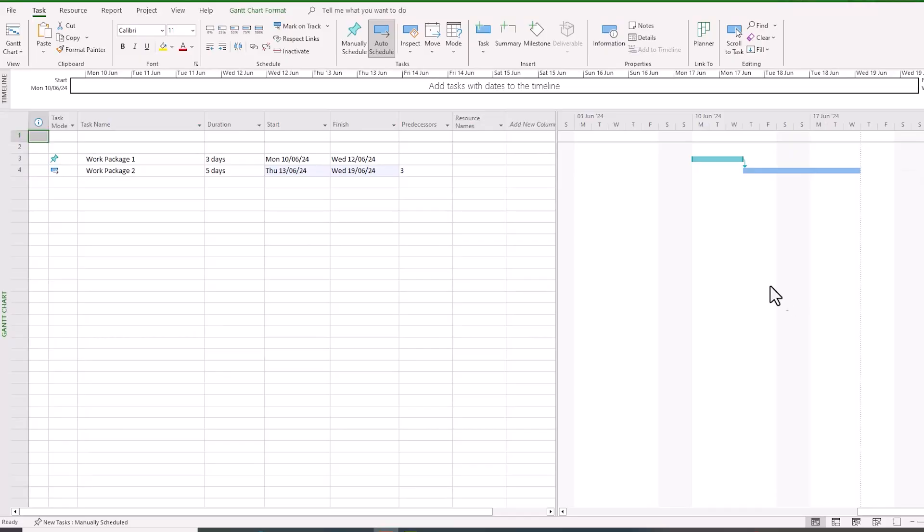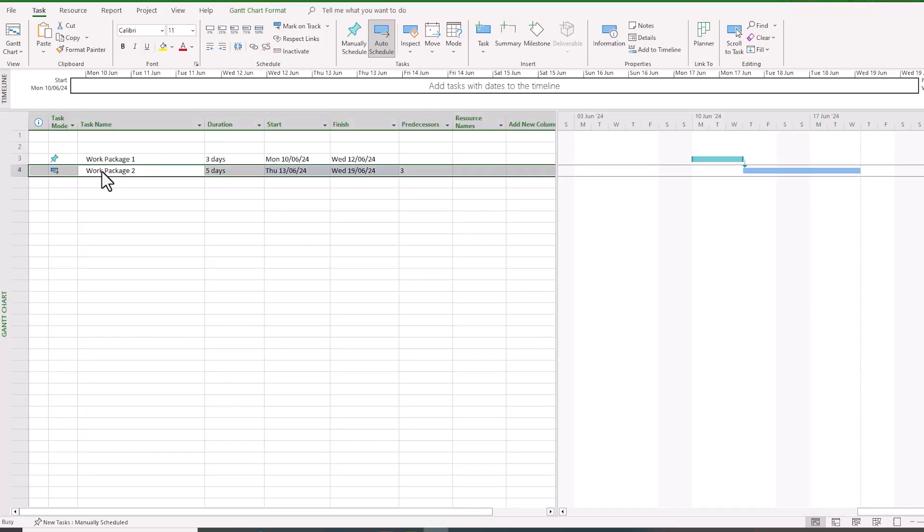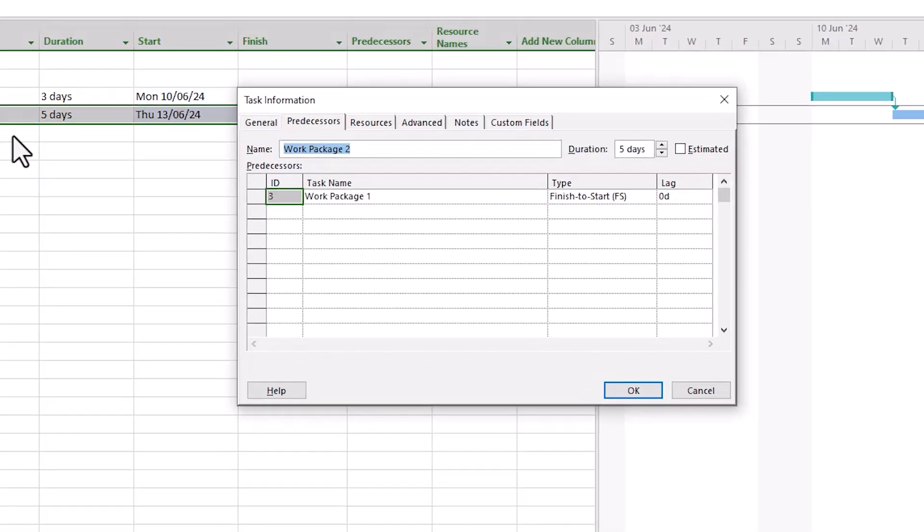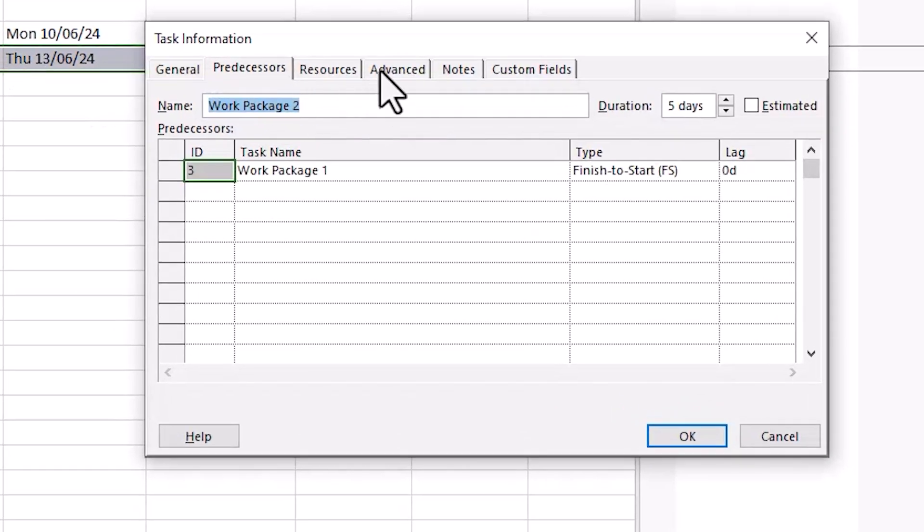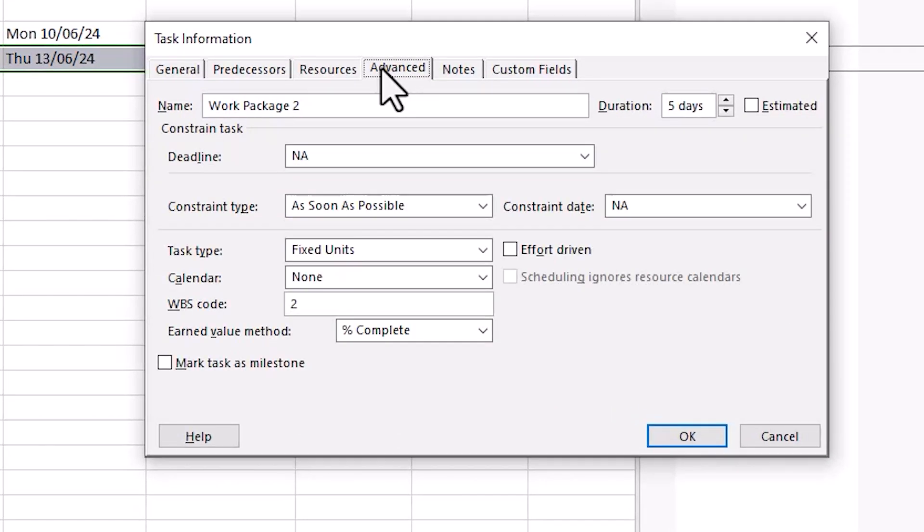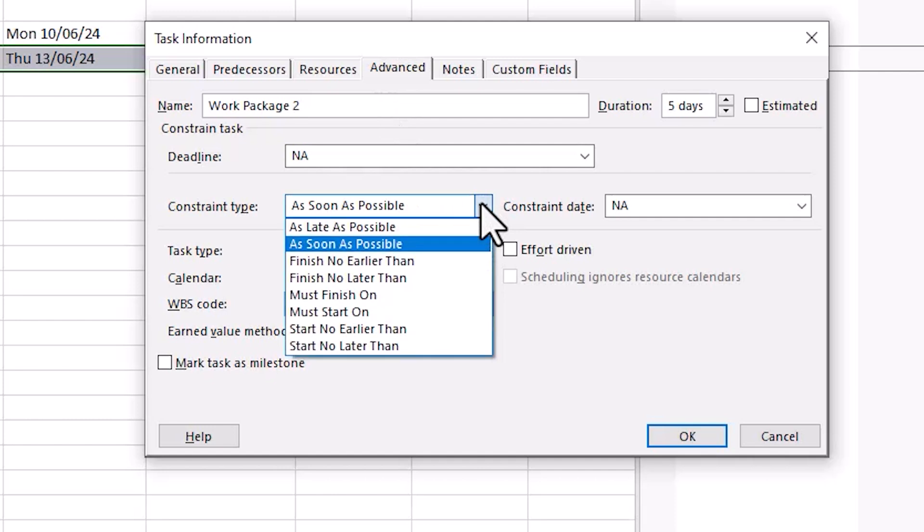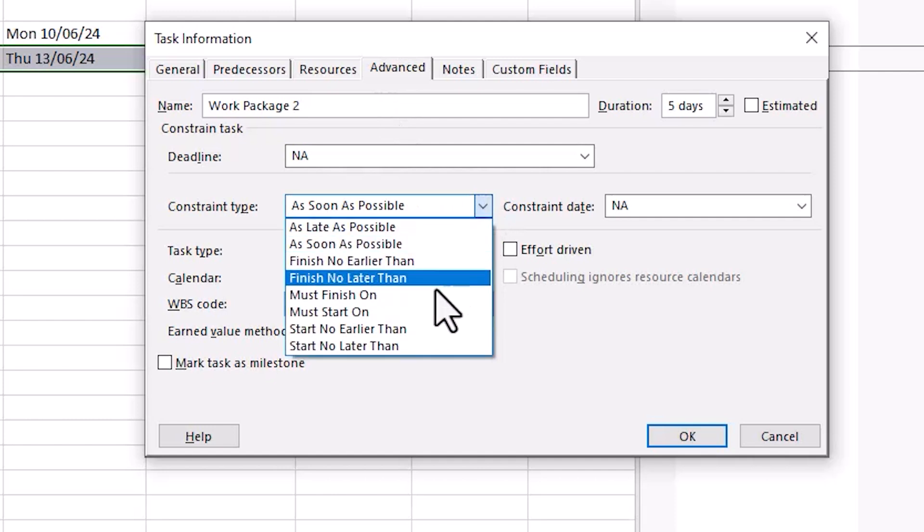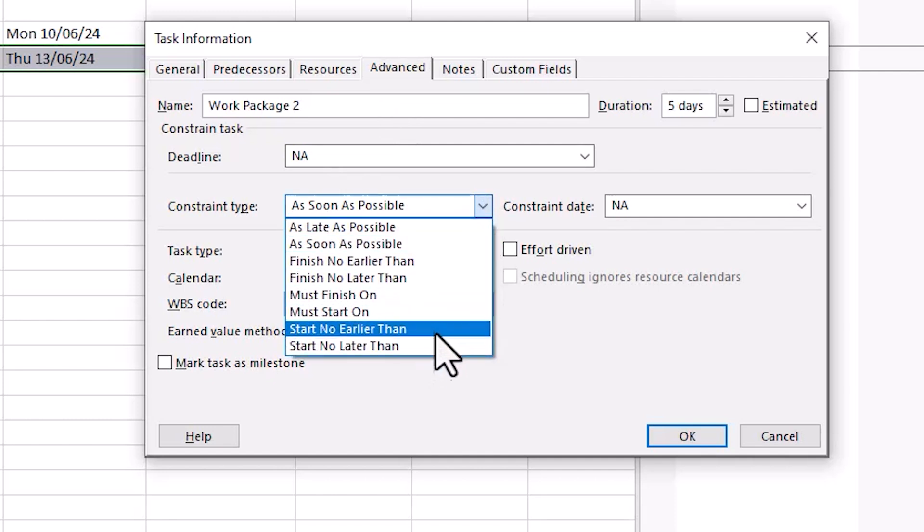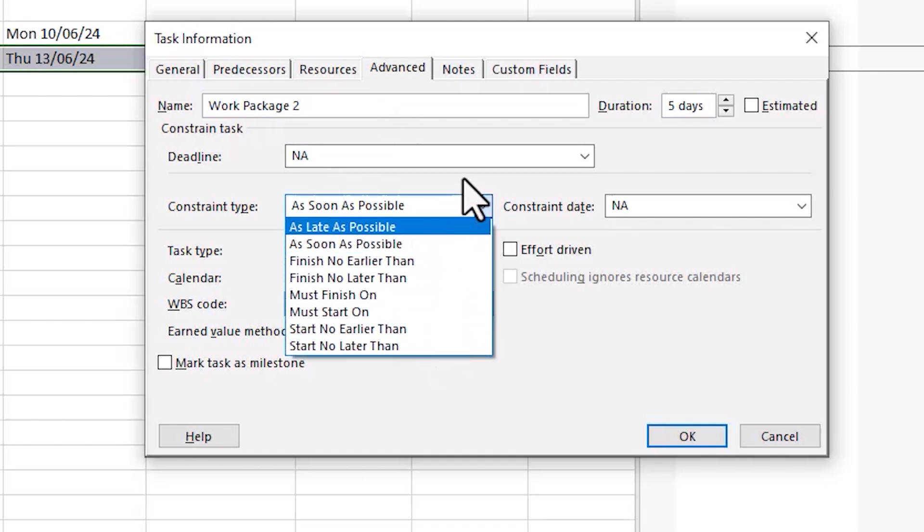Let's take another look at another powerful feature to enable greater precision of your tasks: Constraints. Open the task information window again by double clicking the task you're working on, but this time select the Advanced tab. Here we can see the constraint type selection. By default it's set to as soon as possible. We can select a variety of options from this list, but the ones I'd urge you to focus on are the bottom six options, which are driven by dates.